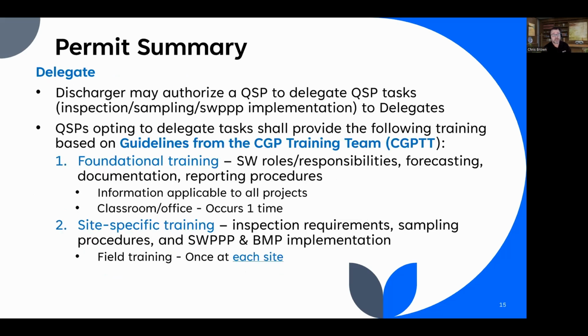Okay. All right. So let's slow down a little bit here because this is going to be very important to many of you, the delegate. Okay. So the discharger can authorize a QSP to delegate their tasks, right? And QSPs who delegate have to provide training based on, this is crucial, the guidelines from the CGP training team. Okay. Well, these guidelines did not exist last year.